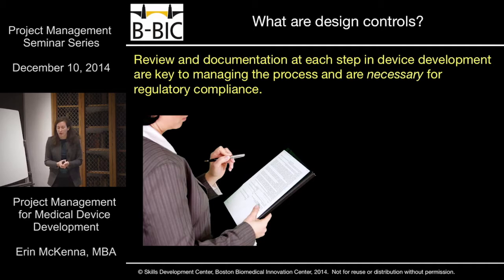That's when you want to start thinking about things that are called design controls. This is a space that regulators will talk about frequently in medical devices, in really any kind of medical development or product development. What it refers to are the documentation and any reviews along the path of developing your device that will define how you're developing, what you're developing, what you're judging to be a correct end product, and then how you're going to measure that and show that you hit those points.